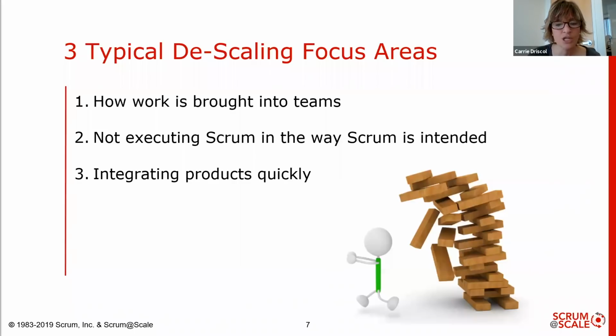And third, when you have multiple teams working on a product, they need to know immediately if the final integrated product is meeting their intended objectives. We need to know within each sprint. We don't want to have integration take place down the road when it's often too late to solve for those problems, causing potential issues and delays down the road.